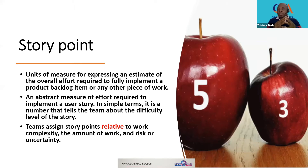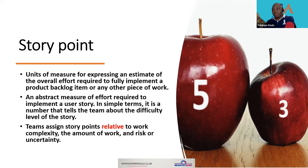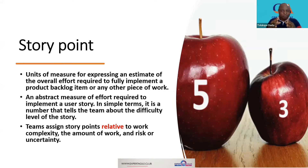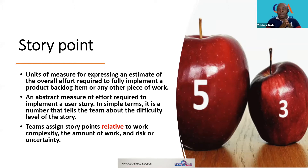The unit of measure for each item in the product backlog is an abstract measurement — it doesn't really mean anything universal, but it means something specific to each team. What a story point means to one team may not be the same as to another. Within a team, everyone needs to understand what the story point is telling them. Story points are used here rather than hours, which is a separate discussion.